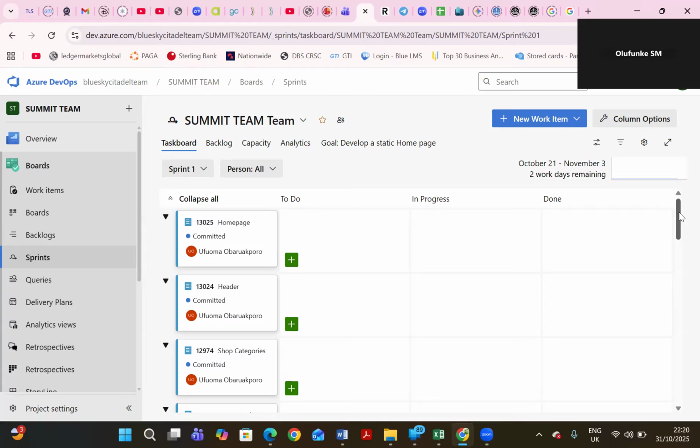And then your QAs can also start work. They don't need to wait for the developer, because they need to write their test scripts. While the developer is working, they can create their tasks and start writing their test scripts. They won't start writing test scripts only when the developer finishes working. When the developer finishes, they just go ahead and do the testing, because they've written their test cases already, which I want to believe they've been taught already. So again, once you have your stand-up, definitely your QAs are in the meeting.